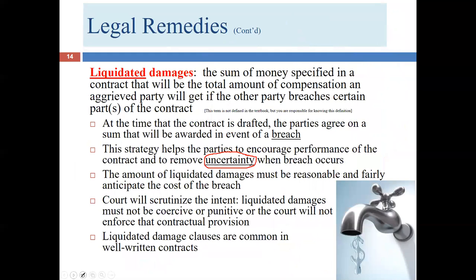But there's an easier way to approach this, and that is for the parties to actually put in the contract what the damages will be if there is a breach. And this is what we call a liquidated damages provision in a contract. They're very, very common. I would say that in contracts for goods of this type, it would be foolish not to include a liquidated damages clause. So what is it? Well, it's the sum of money specified in the contract that will be the total amount of compensation that an aggrieved party, again, read plaintiff,